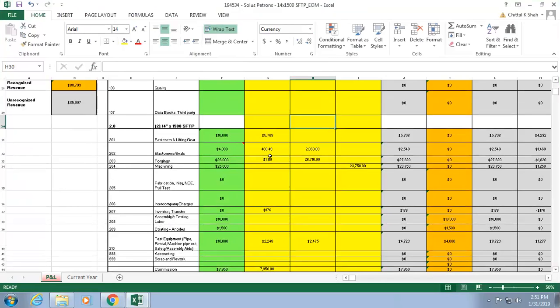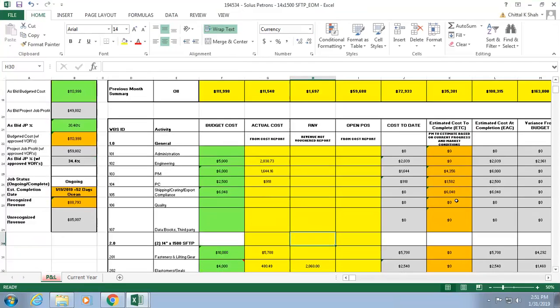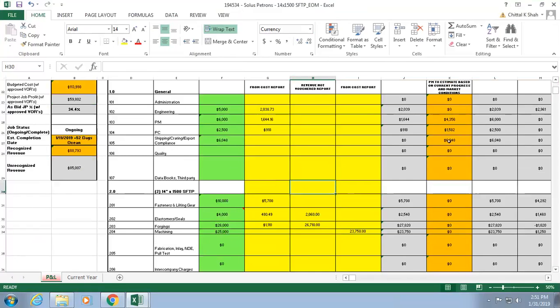Nika, would you like to add anything? No, I think, to Patrick's point, this spreadsheet is a lot formula driven. So if you are going to zero out your ETC and put in a budgeted cost, just make sure you go back and put that formula back, or manually put your ETC back. Stuff like that can eventually down the road cause problems or misstatements. So good point there. Make sure your ETC should never be negative. If you keep things formula driven and this becomes $8,000, you're going to have a negative over here. You should never have a negative.